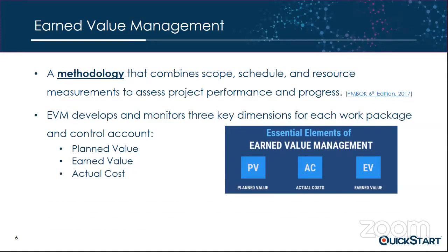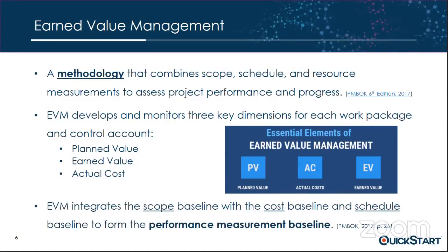And EVM integrates the scope baseline, the scope of your project, the cost baseline, the cost of your project, as well as the schedule baseline. So it takes this baseline information of scope, cost, and schedule, and these three variables form what's called your performance measurement baseline.